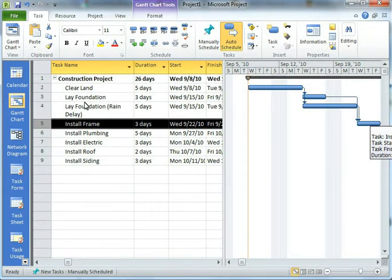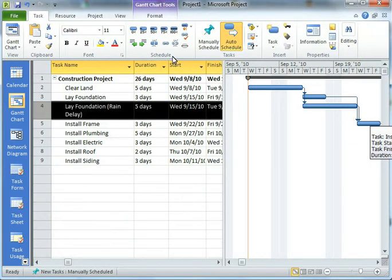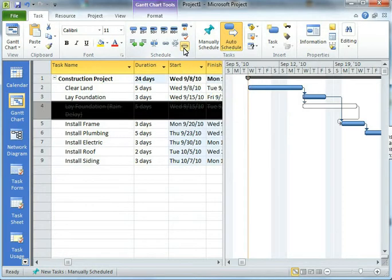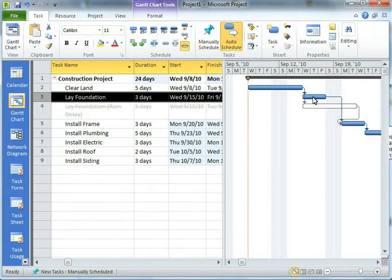I can take lay a foundation with a rain delay and I can hit the inactivate task button here. When I inactivate that, it doesn't delete the task. It just hides it. It's now a hidden task that no longer affects my project.